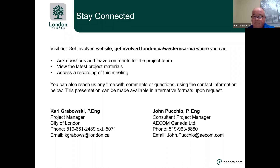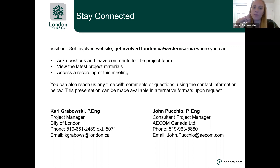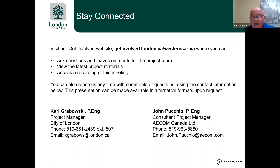Question: the timeline references June 2022 — what is the estimated date of construction? If the environmental assessment proceeds as planned, it would close in the fall of 2022. From there, we can retain a consultant to carry on with detailed design. There may be utility relocations in 2023 and construction could start in 2024. There is coordination and discussion with Western as to how that can work as well.